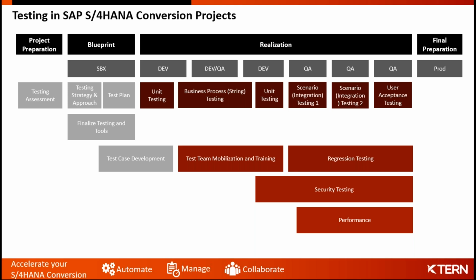We have to make sure we have a strategy, followed by a plan, followed by the test case development or the test case creations. Under each test case, we might have to come up with the test scripts on how to do the test case, where to click a button, where to enter a field, and things like that. And we have to capture the test case result, the expected test case result, so that the testing team